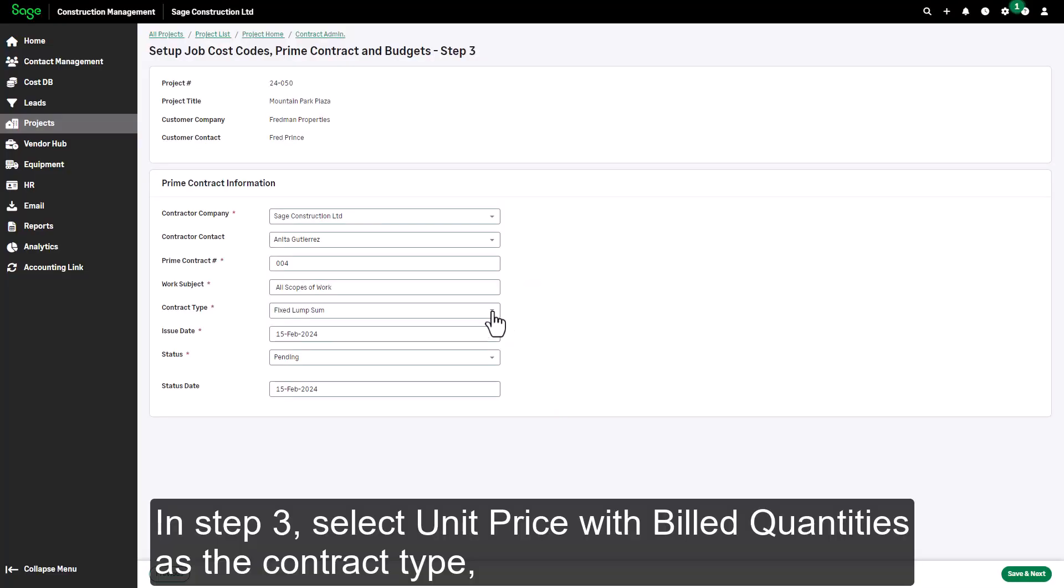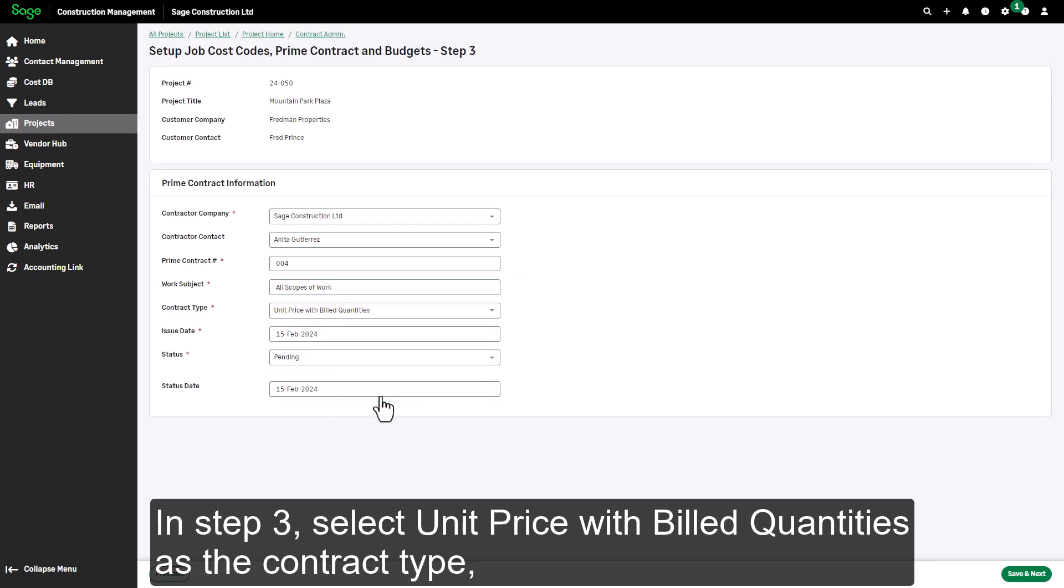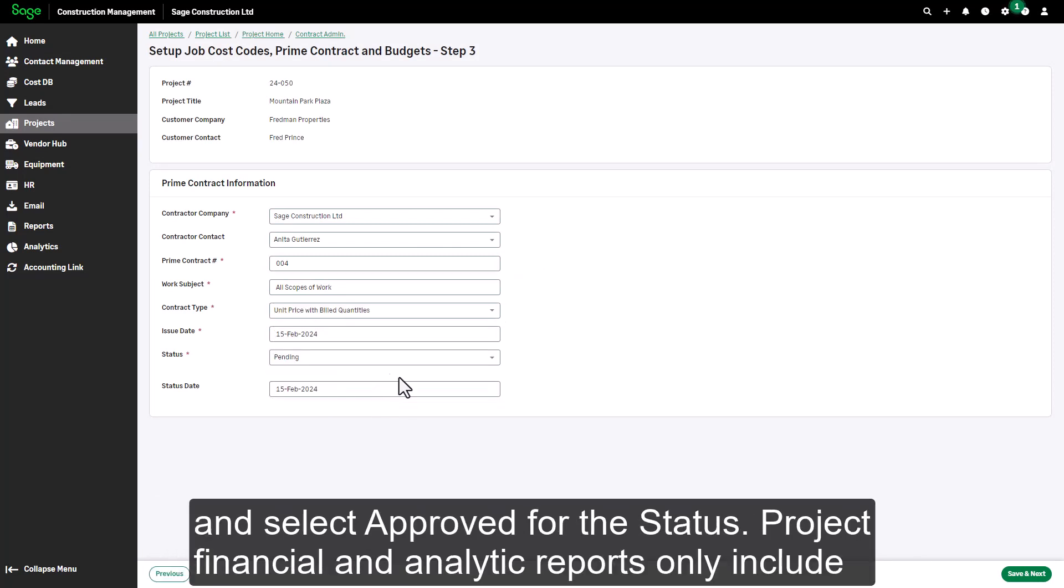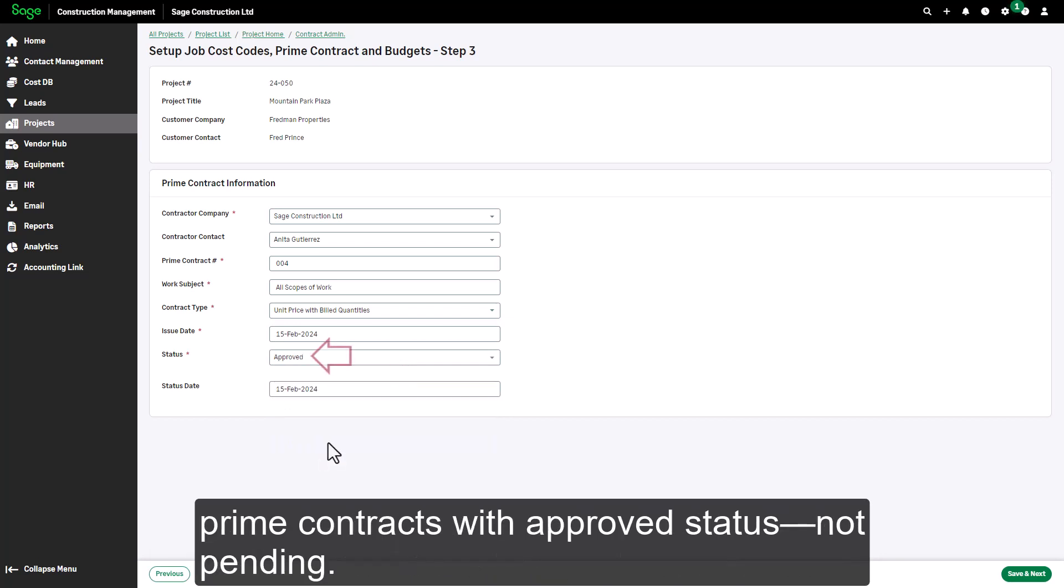In step three, select unit price with build quantities as the contract type and select approved for the status. Project financial and analytic reports only include prime contracts with approved status, not pending.